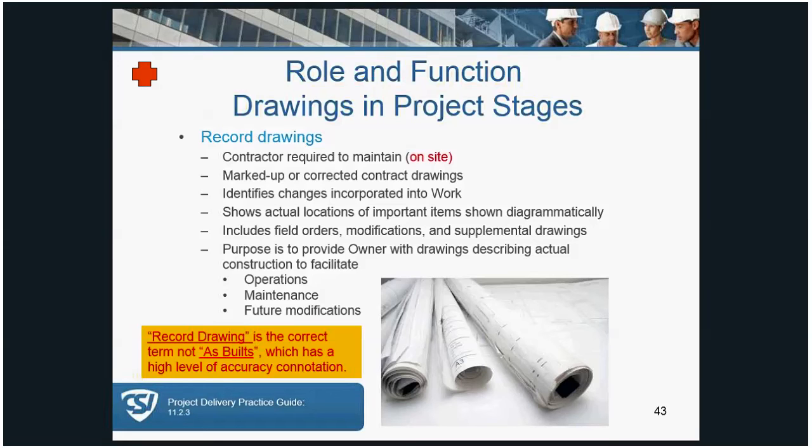During the project closeout phase, the drawings are typically turned over to the owner. Sometimes the owner, however, will request the architect to update their CAD files or their models to reflect any changes. These record drawings may include a paper copy or maybe an electronic form. If a BIM modeler's CAD file has been used, then the contractor may have software and update this and provide it to the project team. Obviously, this needs to be included up front.